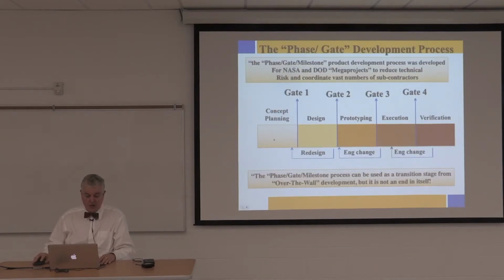Because there could be a faster way. If you just wait until everything is done here before you go there, then everything is done here before you go there, you may not be able to reduce the lead time. Maybe if you do 80% of the activities here at concept stage, perhaps you can then move to the next stage without incurring risk, and then the other 20% you can catch up. But if you wait until all the activities are done, you're adding to your lead time.